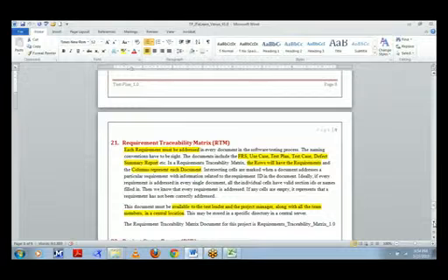And the next one is the requirement traceability matrix. This is a document which will provide you a way to retrace each of the requirements specified in the FRS. It is in table format. Row-wise you have the requirements, and column-wise you have the document names. The intersection of those gives you the reference for that particular requirement ID. I think Niranjana is going to present on the requirement traceability matrix.